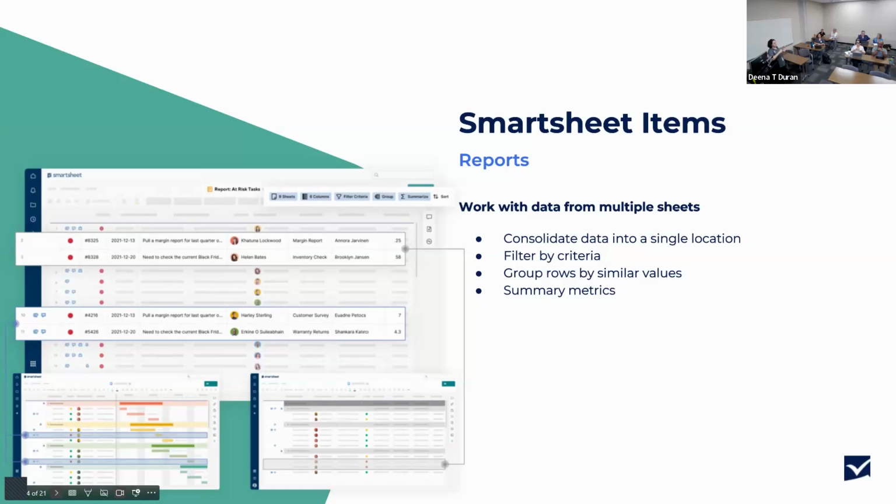In the template, the way that project schedule is labeled, it has the greater than, less than brackets, and it has project name, all capitalized. That way, when we duplicate the folder, folks know that they need to change that to their actual project name. So I have another filter that says if it does contain project name, to exclude it.